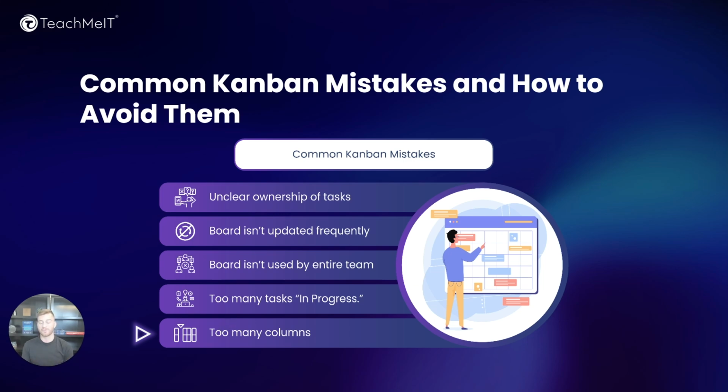Make sure that when you're doing board reviews, you're not just checking different types of tasks and the column names, but you're also checking how many columns that specific Kanban board has. Additionally, you should make your team aware that 3 to 7 columns is best practice.